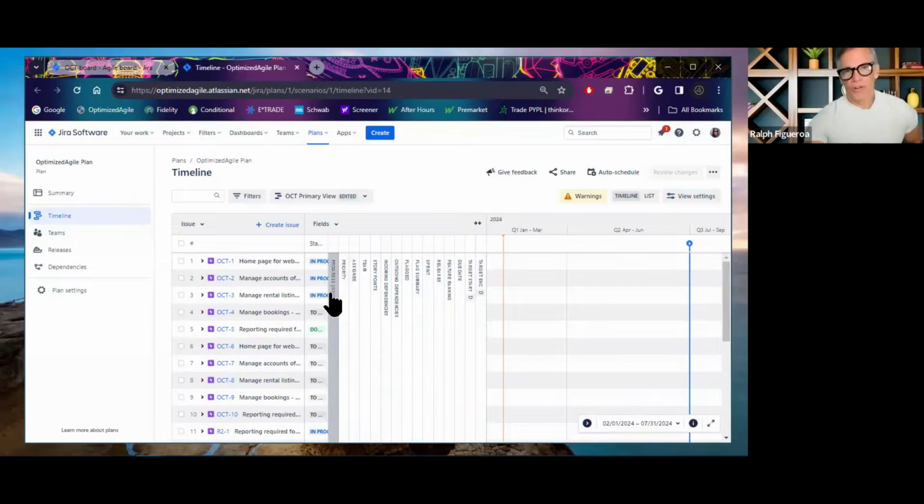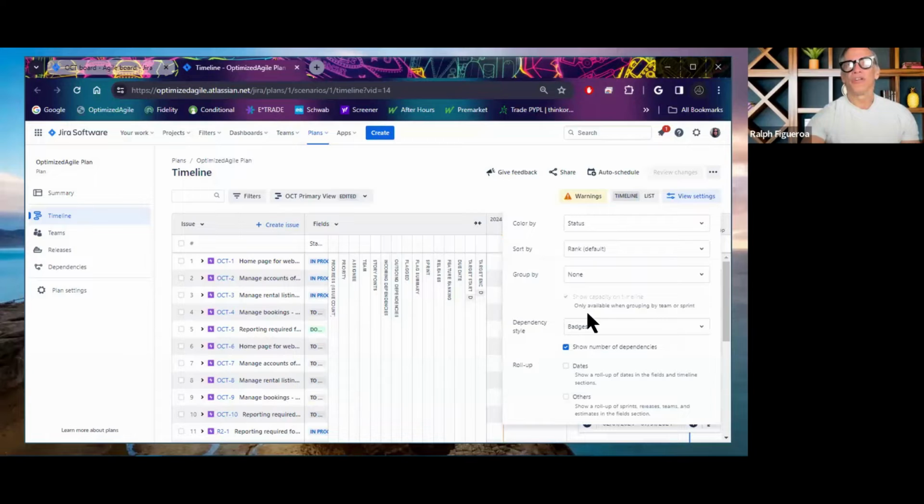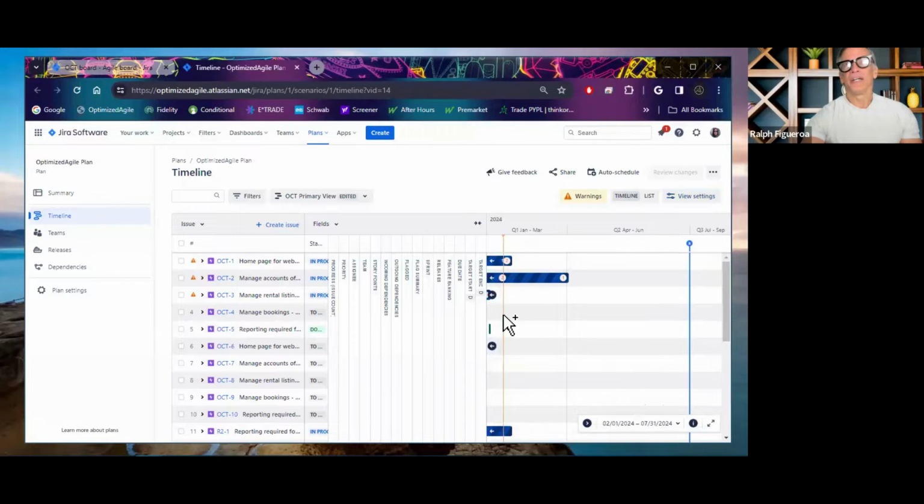If you are using Scrum in your teams and you have sprints, and the sprints, as you all know, are based on a start date and an end date, Jira Advanced Roadmap has this roll-up functionality that, if you're using the Scrum framework, rolls up the activities from the sprints and releases automatically for you.